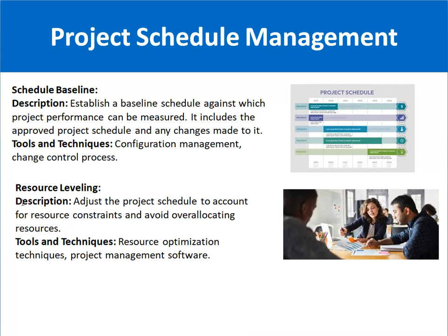Next is resource leveling. The resource leveling factor is that, friend, many times over allocation happens. Over allocation means that one resource is over allocated, like he is working for 10 hours or 15 hours or 12 hours, and another resource is only working for 3 to 4 hours. So the resource leveling concept is the appropriate allocation of resources, so that everyone is working appropriately, and no resource should be over allocated in the schedule.